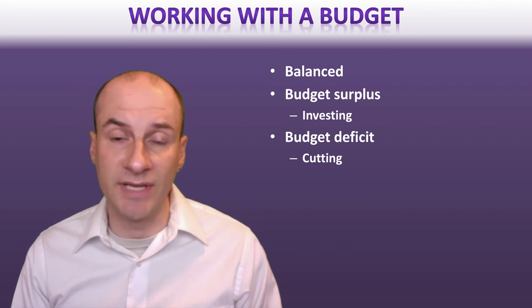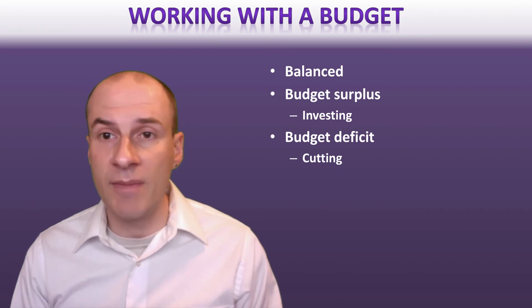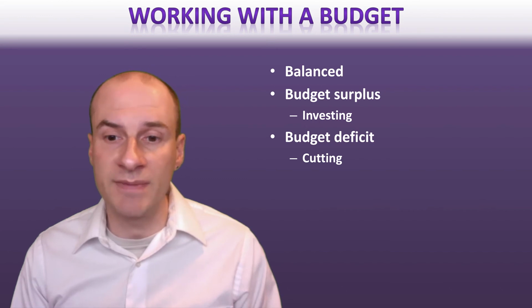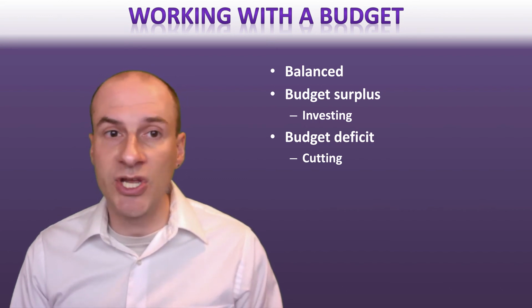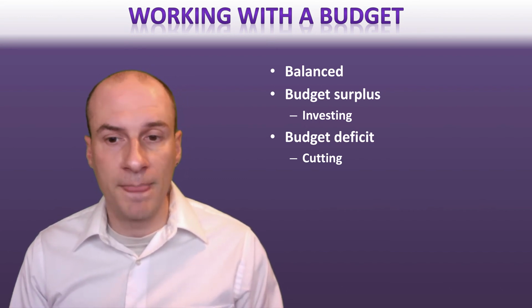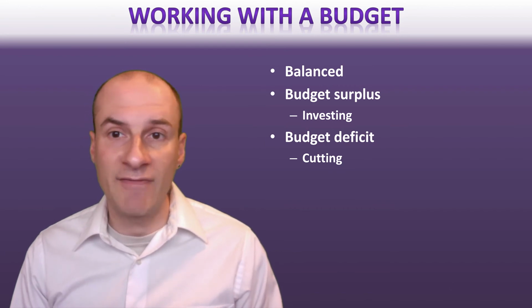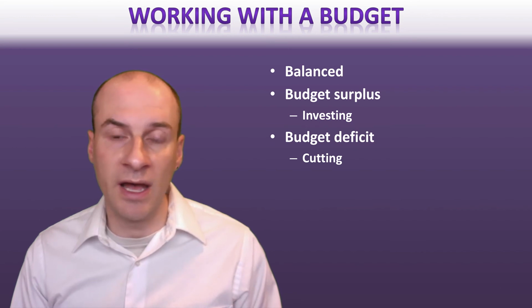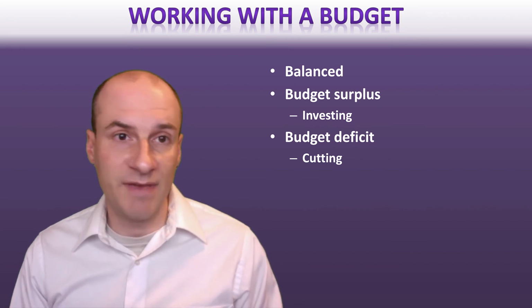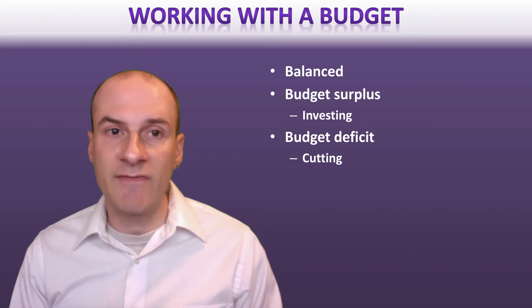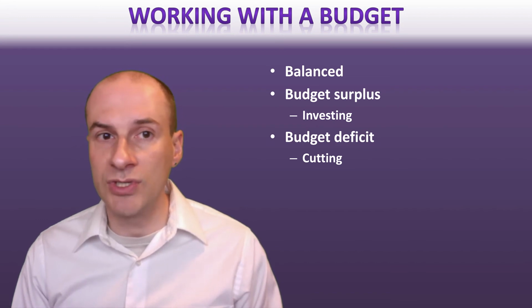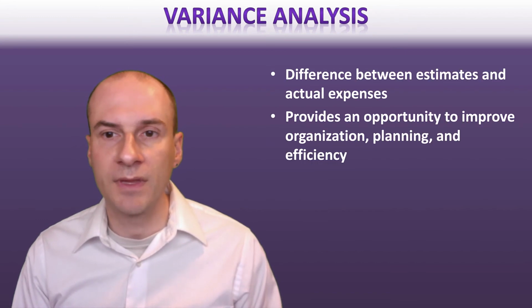Now, there's another possibility in terms of your budget, which is that you come out and you've spent more than you anticipated. Sometimes that means that you're going to have to request more money from your organization, or sometimes it means that you have to cut out things that you've been using in your project. And that can be very difficult. So having a budget deficit is something that you really want to avoid, of course.